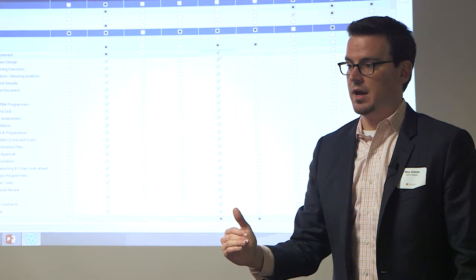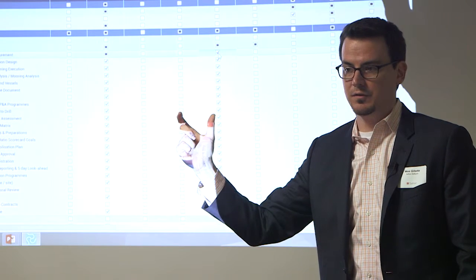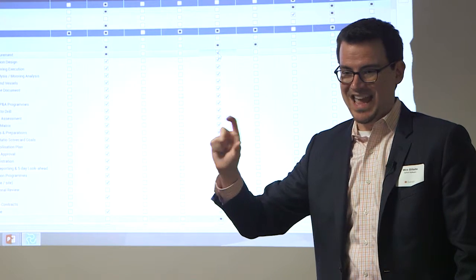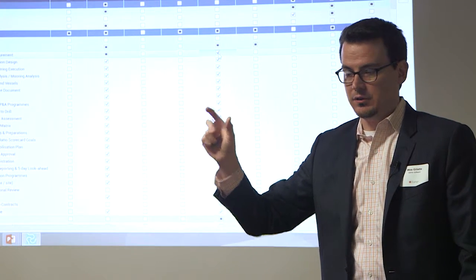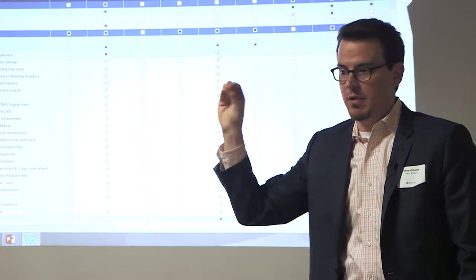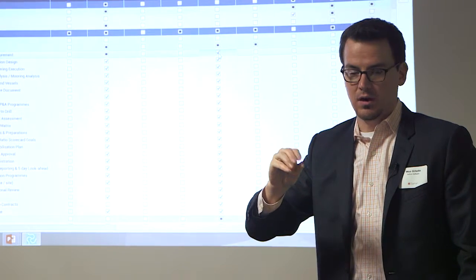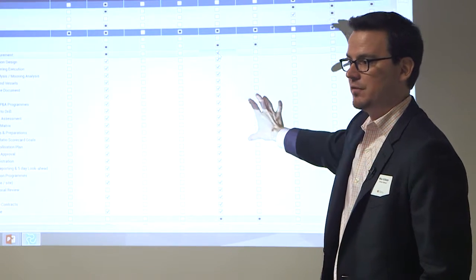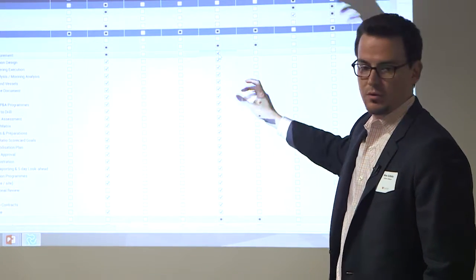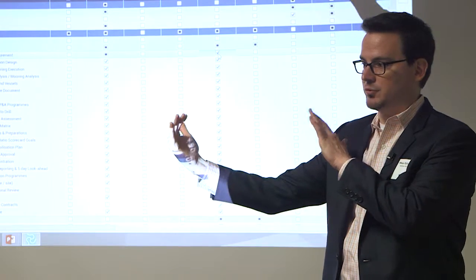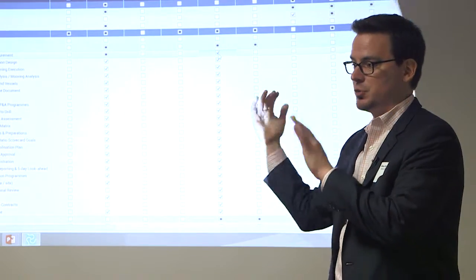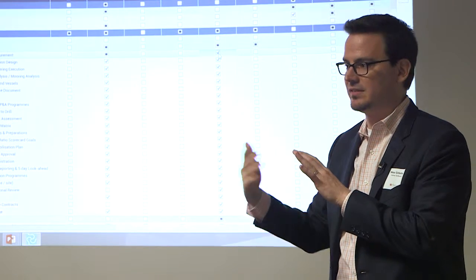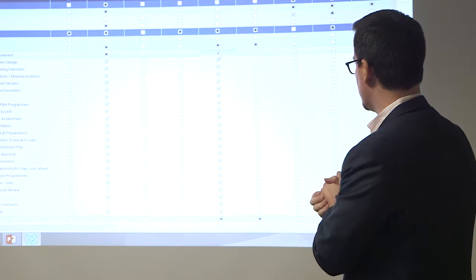If you think back to how we defined that risk before, it's a risk factor, it's got a percentage range on it, and it's correlated by default. So if I'm thinking in my mind, I want -20 plus 50 on all of these activities, and that's how I defined it, I just got it. We handle that for you. So no more central limit theorem. I put -20 plus 50 on it, and I'm going to get -20 plus 50 for that range of activities. So we've killed that execution flaw in a lot of the other tools.